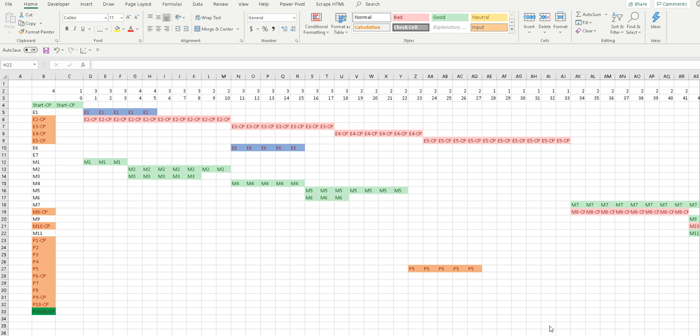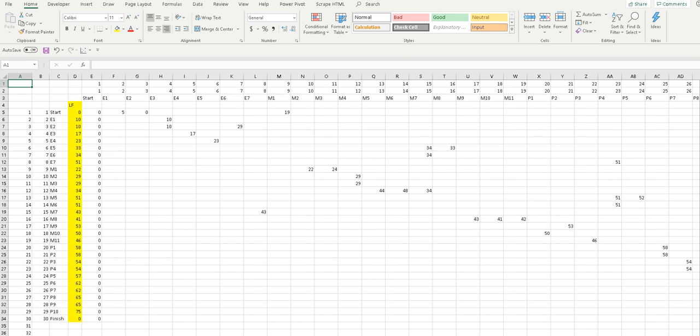Okay, this is the third video in the Excel network series showing you how to create an Excel network. We're ready to work on the latest finish chart, and we just finished the early start chart. If you remember, the latest finish is the latest finish of the successor minus the duration of the successor. So that's what we should have in each of these cells. Again, we only do a calculation where there is an arrow, and the arrows are on the arrows chart.